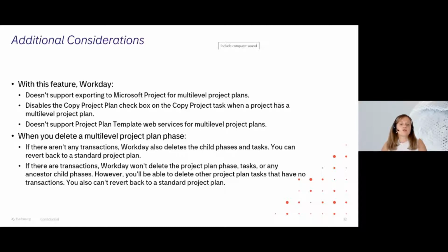When it comes to the actual plans, when you have created a plan with phases and subphases, then if there are no transactions on the project plan phase, you will be able to delete this phase. And Workday will also automatically delete all the child phases and tasks under that phase. And at this point, you can still revert back to a standard project plan.